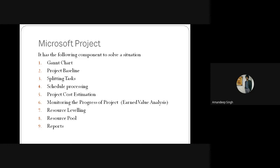The next component is resource leveling, which means fixing the time schedules. We can select manual leveling or automatic leveling in the software. In manual leveling, we enter values such as the project must finish by a certain time, or the class must start at 11:00 AM on a particular date, or the project must finish as late as possible from the finish date. These numbers can be fixed in the Microsoft Project software.